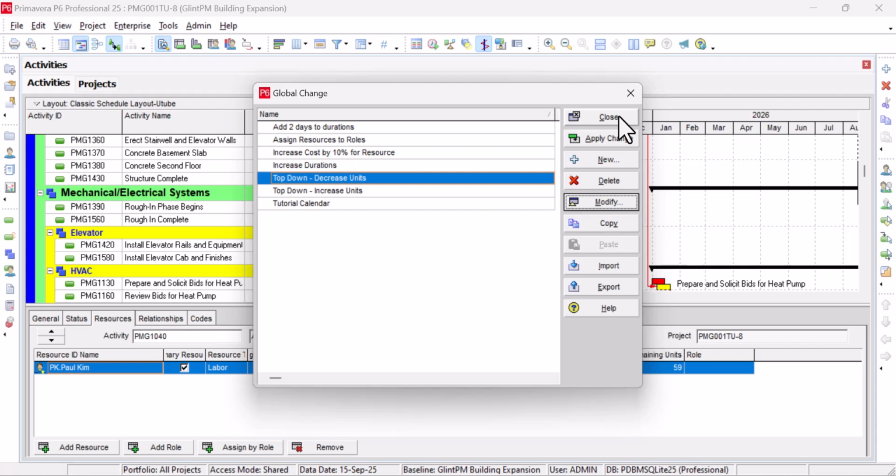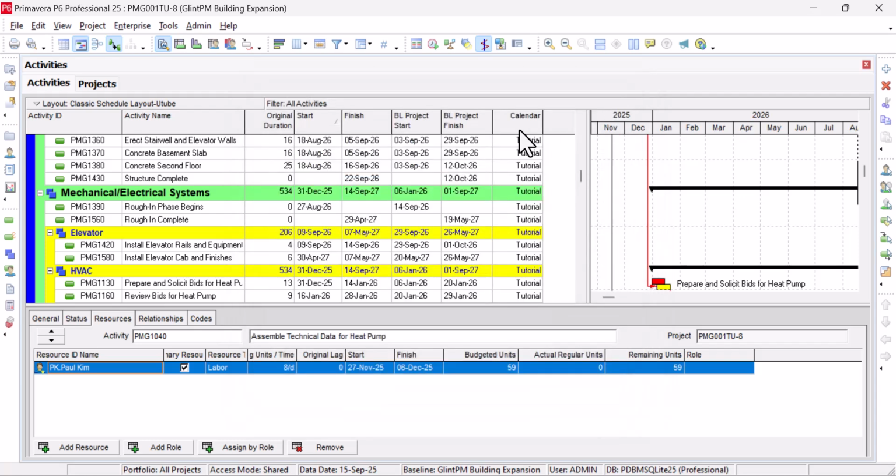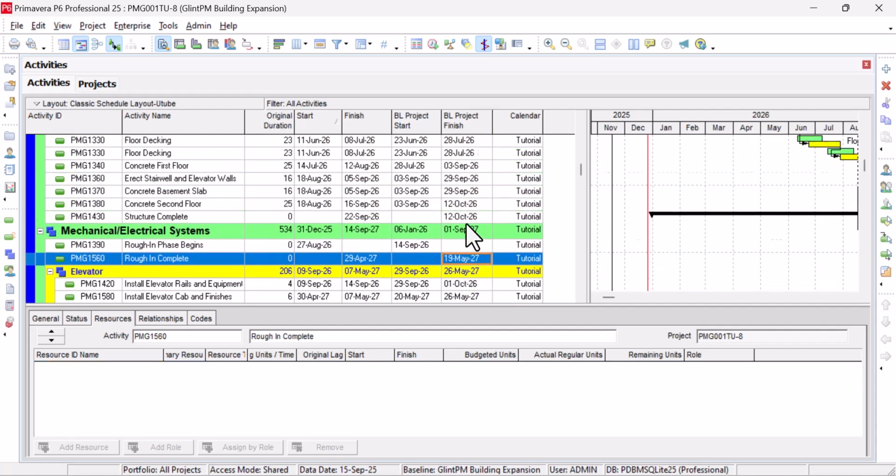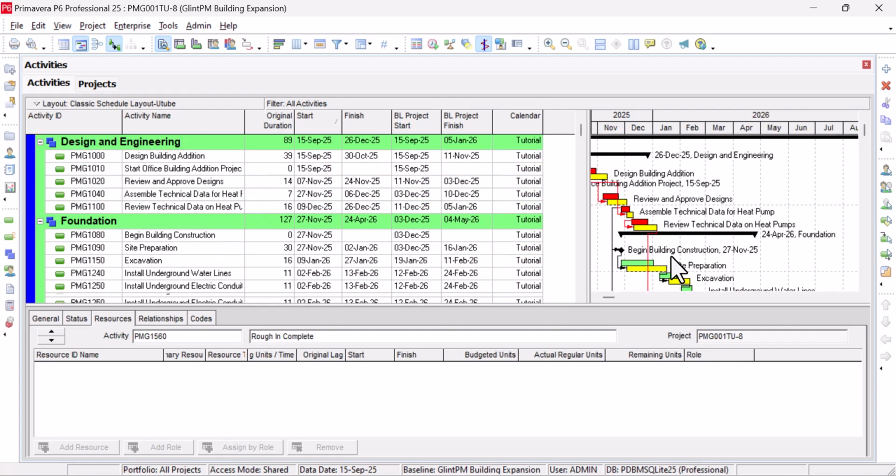And like I said, the usefulness is that it's very fast. You can easily make changes, but the disadvantage is: always double check, have a backup, and know why you are making these changes. Document it so that in case there's an error, you'll be able to recover it. Otherwise, if the changes are applied and committed, as you can see in what I demonstrated, then it's permanent. You can't undo it. There's no way I can undo all the changes I made just now. So yeah, permanent. So that's what I want to demonstrate to you guys.